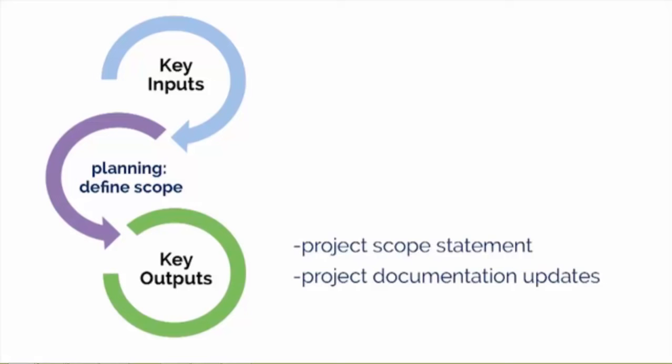The project scope statement is a detailed description of the project scope, major deliverables, assumptions, and constraints. It enables project teams to do more detailed planning, guides the project team's work during execution, and provides a baseline for determining if requested changes and work are within the project scope. This baseline comes from the project's acceptance criteria stated in this document. Without this statement, project scope management does not happen. Without project scope management, the project is likely to wander, run over budget, and oftentimes fail.